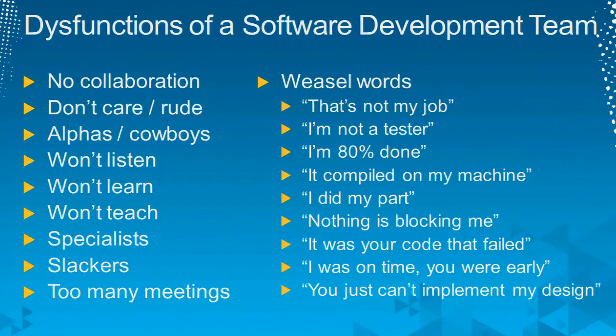Yeah. Get them working on things outside their specialty. Pair them up with other people and start to drain off that specialty information, the knowledge, so other people can do those testing tasks or database tasks for light tasks. Cross-functional team means, yes, you have the capability to do everything required to deliver that increment, but it also means that no one person is a single point of failure. So not everybody on the team has to know everything, but enough to cover the lottery-ticket, called-in-rich syndrome.